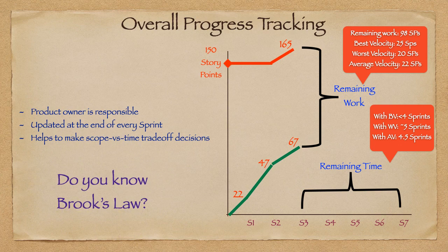And do you know Brooks' law? Brooks' law talks about when you try to add more human resources to a project which is about to miss the deadline, it will take even more time. It cannot be on track.